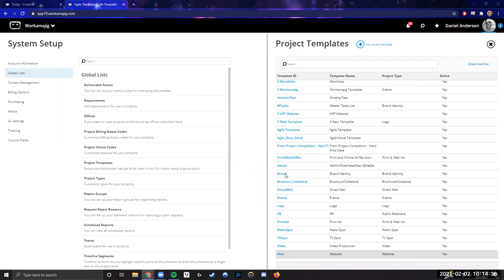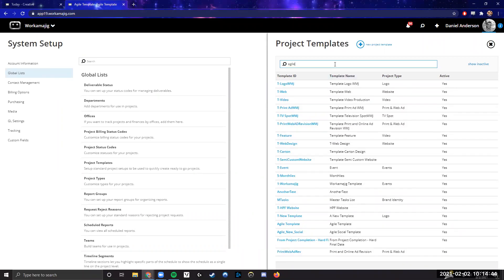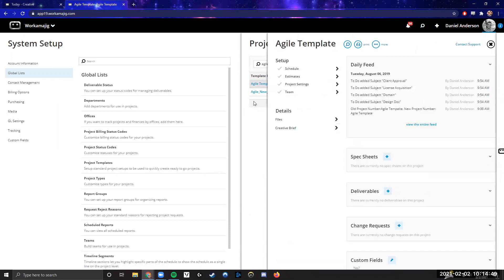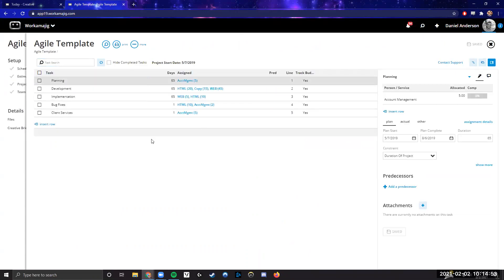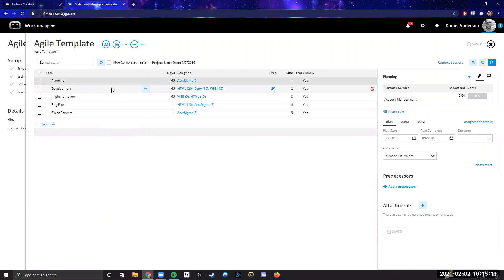For agile, we tend to keep more open-ended tasks, which is conducive to Kanban boards. The agile template I built for web design has tasks that are more open-ended with no predecessors — all tasks are set to 'duration of project.' For things like bug fixes, this is where it can really shine: we don't know what bugs we'll encounter upfront, but this task gives a place to put hours and assign users as things come up. If you're using to-dos, you can have a changelog of all the bugs that have come in and been fixed. To-dos are an extra detail piece for a task — you can have several action items marked off while still having the task open to log time to.